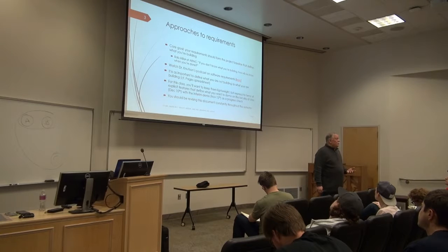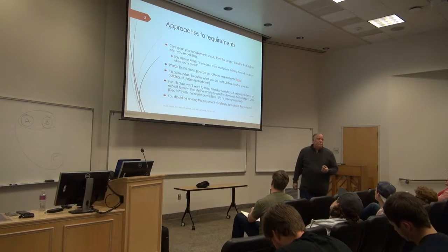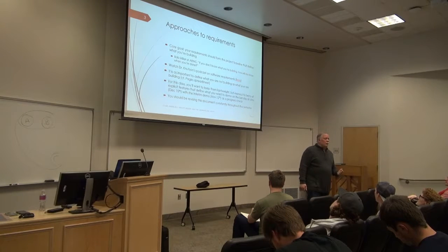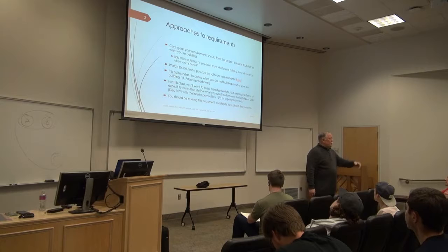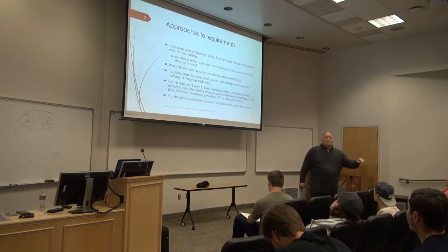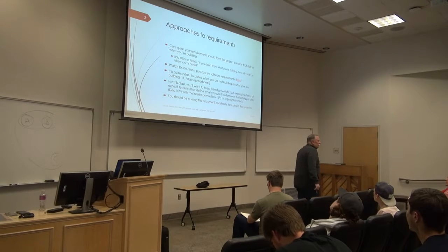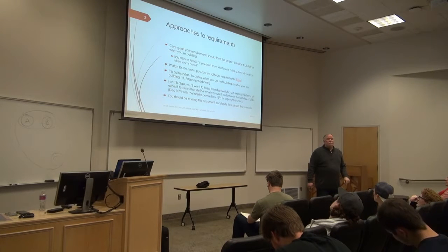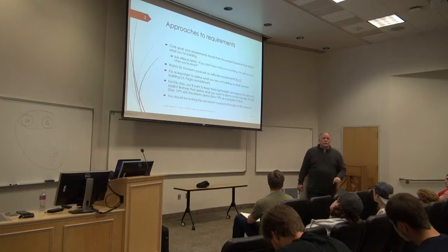And Bob and I worked very closely together for about 3 months, and it was a tremendous professional education for me. Very first meeting, Bob Miller asked them, where are your requirements? Where are your baseline documents defining what you're trying to build? And the people there at ARINC all looked sort of confused, and they had a few diagrams and binders. He said, no. I'm going to be here once a week from Arizona. I'm not going to be happy until there is a box or a stack of binders sitting on this table for a meeting that defines exactly what you are and are not building. And he said, if you don't know what you're building, how do you know when you're done?